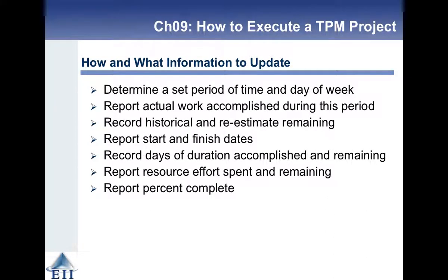So there's lots of information about a project, and how do you update it, and what do you update? Usually you set a particular period of time and day of the week, and you issue the report on the same day of every week. So report the actual work accomplished, record what's done and re-estimate what's left. Make sure you report start and finish dates, record days of duration, and the accomplished and remaining days. You report the resource effort spent and anything remaining, and you report the percent complete.